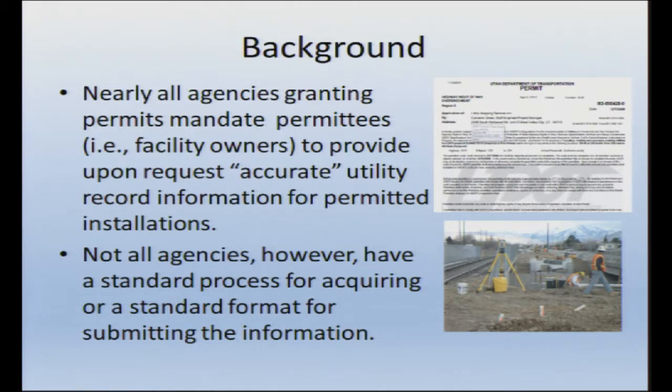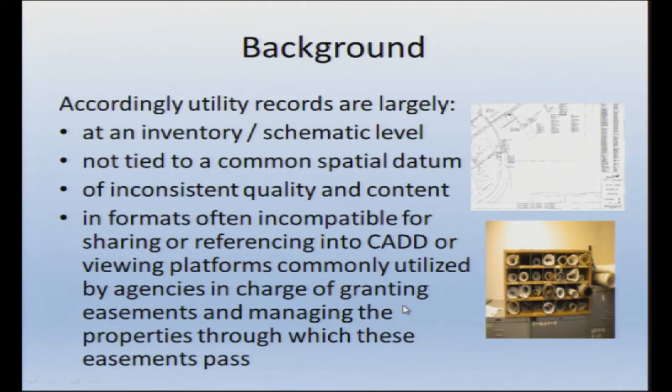But all agencies right now have a practice where they say, go ahead and you can go in our right-of-way and collect accurate information. But nobody's ever defined what accurate is, and that means anything. And they don't have what information needs to be collected. So this would be your standard permit requirement, and it's very little direction on how to go out and collect the information. And so we've kind of created our own problem.